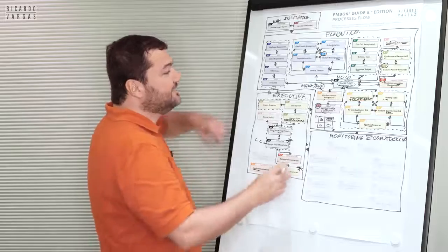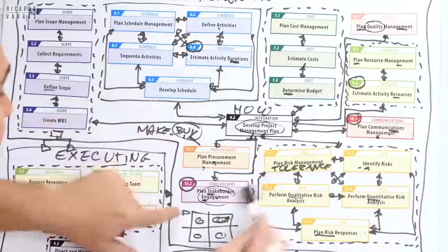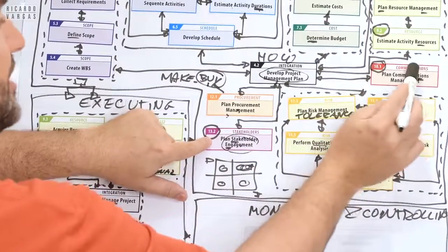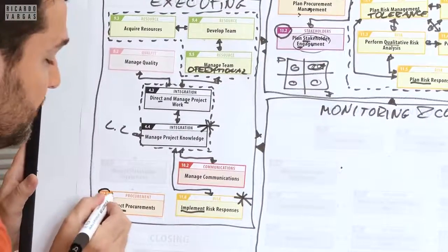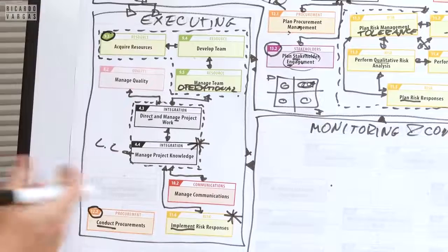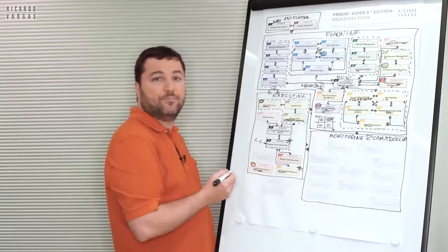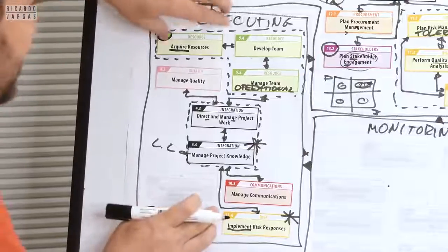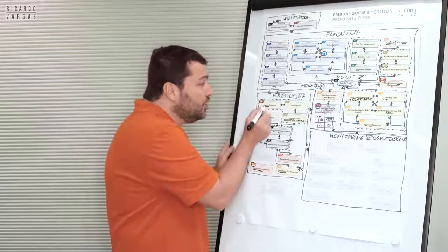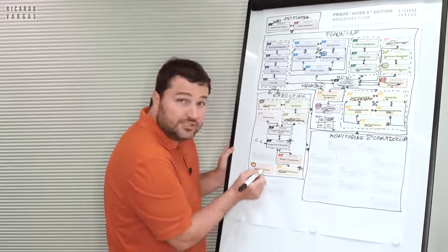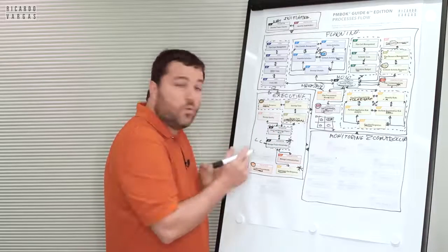One important thing I said about the twins here, remember? Between activity durations and resources. Twins here between stakeholder management and communication plan. Now I have the 3rd set of twins. Conduct procurement and acquire resources. Why? Because most of the time, the way you acquire resources will require a procurement process. So these are presented in 2 separate ways, but in reality, they are all the same thing. Because you need to buy a material, then you need to conduct a procurement to buy that material. So these are 2 processes that are very well connected.